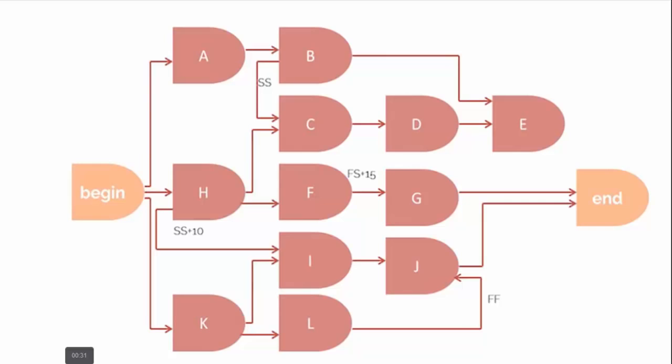As you can see here, the schedule network diagram visually depicts how all the tasks in your schedule string together. While the WBS shows you how many tasks you have to accomplish, the schedule network diagram shows the order those tasks need to happen. It's a great way for starting to understand and visualize how your project will proceed.